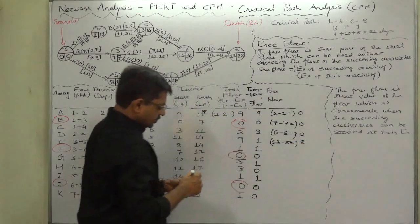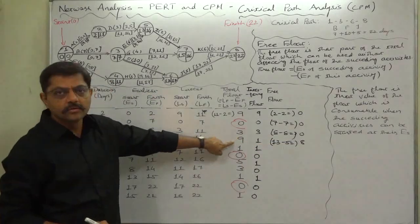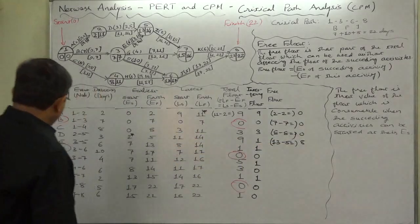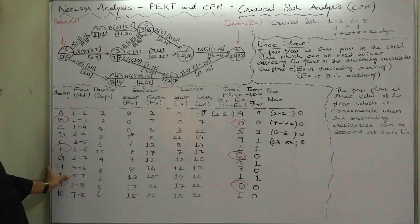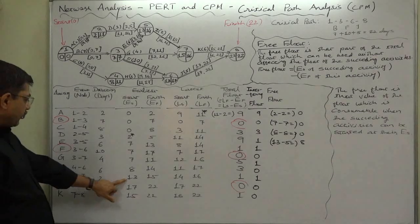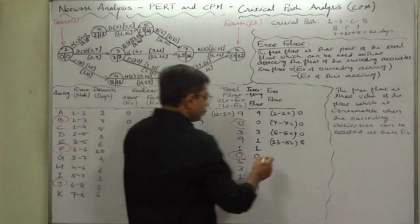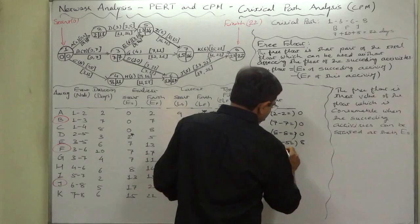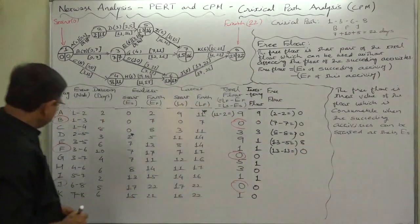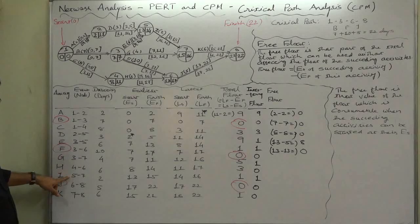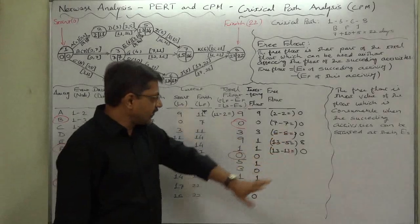Note that the total of these values doesn't exceed the total float. For activity E, the succeeding activity is I. The earliest start time of I is 13 and the earliest finish time of E is 13, so 13 minus 13 equals 0. Note that I is a common successor of D and E, but the floats are different.